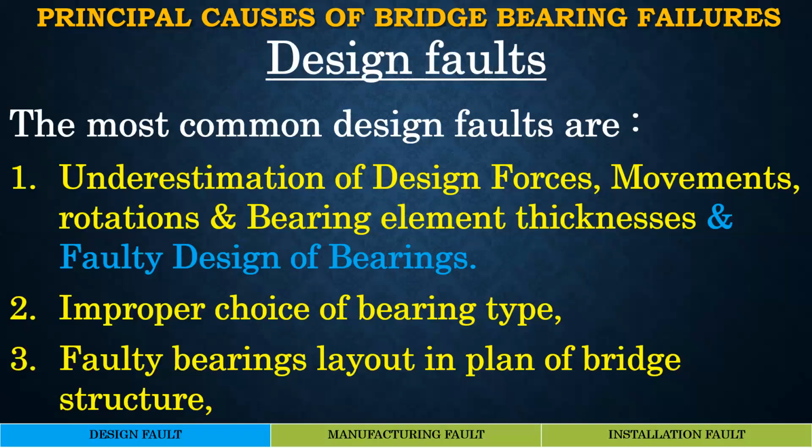Let me tell you that many times this underestimation of design forces or faulty design is done by intent by some vendors in order to save initial cost. Particularly in an EPC mode of contract, where each and every penny counts for the contractor, this is a very dangerous practice which we have seen. Therefore, the people who are doing the proof checking or the independent review have to be very careful, and checking of designs is extremely important.